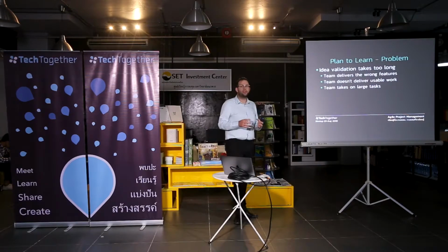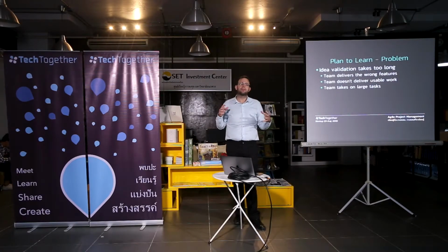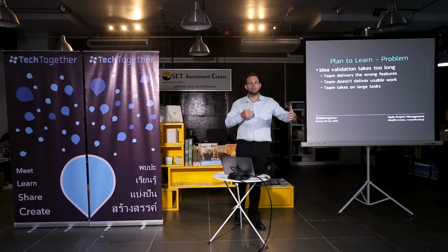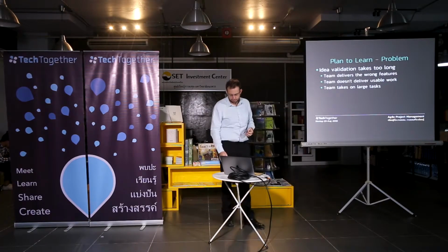The team is working on tasks that are too big, which means it's taking them a long time to get to a point where they deliver something. And I have a very subjective idea of large. For me, a large task is something that takes more than a day.